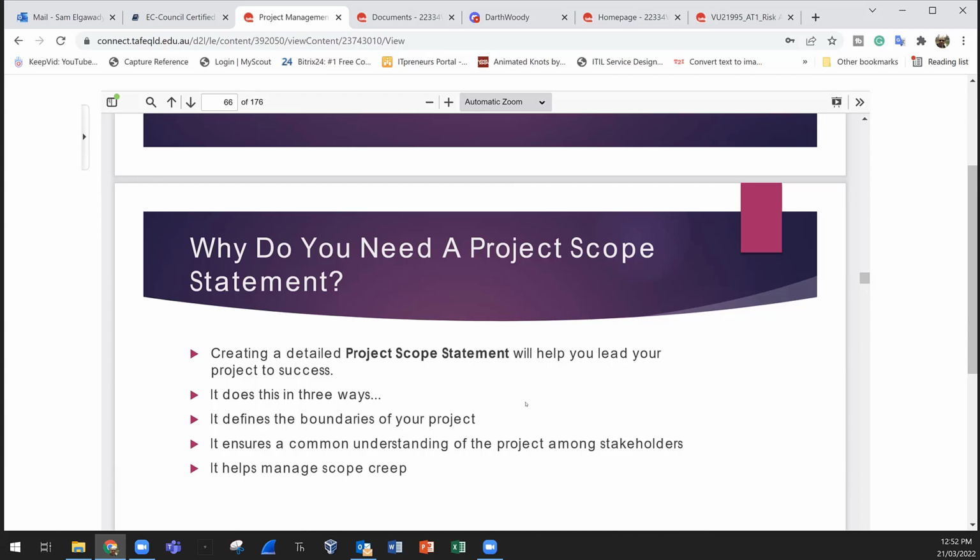So for example, we will have a 2-story building located in this area, and this will serve as the new bank branch. You can add some more details. It's blue because it matches the blue building. It matches our color theme. It can have more than or around 150 employees. You can add that to the scope statement. It will be built within a year. It will cost $1 million. So a kind of high level details.